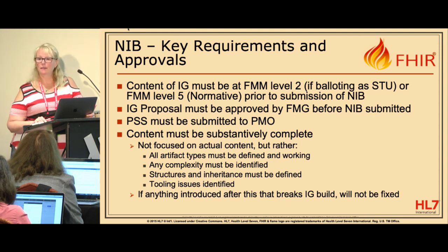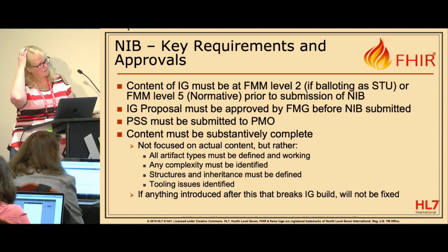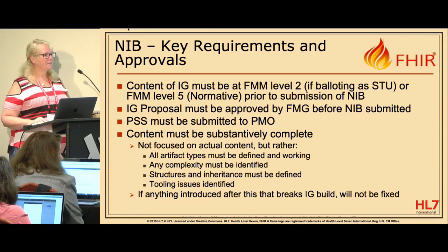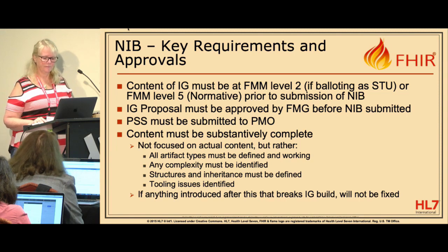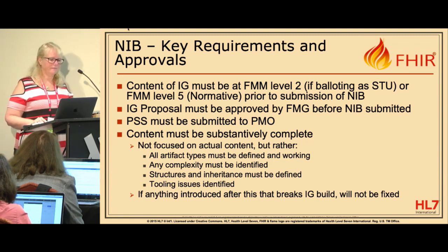That's now. And it's not just, you have to have 3 organizations testing it at the connect-a-thon, is that correct? You need to have 3 independently developed systems from different organizations. And it doesn't need to be at an HL7 Connect-a-thon. Right. You can hold a virtual Connect-a-thon so long as it's open to the public. Anybody who wants to participate can. That still counts. The intention is that we try to avoid taking things to ballot that have never actually been implemented in code. We want to make sure that it actually works for real before we have the ballot community review it.